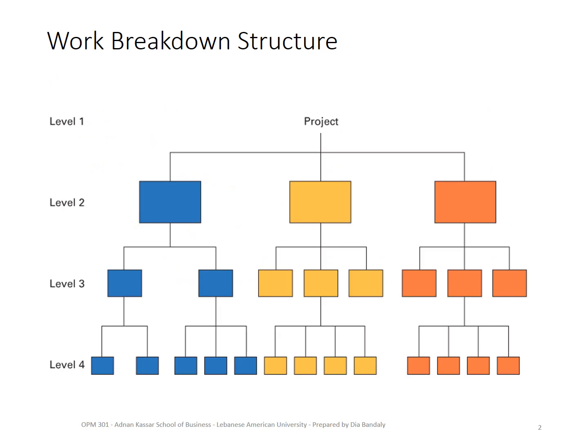Okay, this is an illustration of the WBS that we talked about in the previous slide. Let's have a very simple example about how the WBS works. You can see first here that we have different levels, right? Level 1, 2, 3, and 4, where level 1 includes the whole project. This is what I was referring to when you initiate the idea of a project. You simply describe the project itself, right? You don't have any detailed information about what would happen in order to achieve it. And then you start breaking it down into level 2, which is the main components, then level 3, which are the lower tier components, and then level 4, which are the individual activities and tasks to be done.